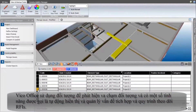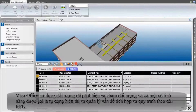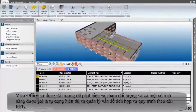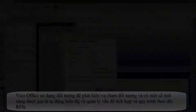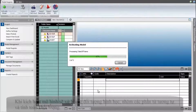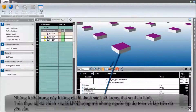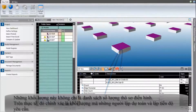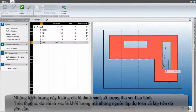VicoOffice uses object-to-object clash detection, has some cool auto reveal features, and an integrated issue management and RFI tracking process. Activating a model processes the geometry, groups similar elements, and calculates quantities. These quantities are not just the typical rudimentary quantity lists — they are what we call construction calibre quantities, exactly what the estimators and schedulers require.